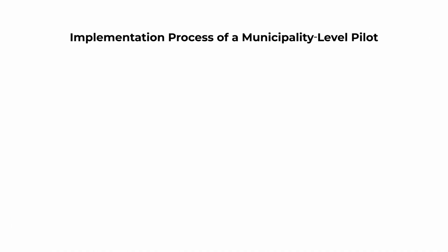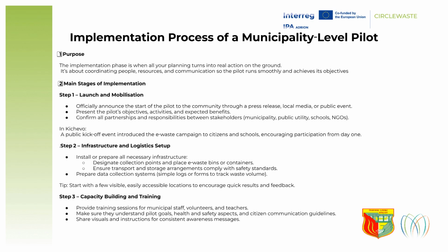The implementation phase turns planning into action, coordinating people, resources, and communication. Major stages include launch and mobilization, infrastructure and logistics setup, and capacity building and training. In Kicevo, a kickoff event mobilized citizens. Infrastructure setup involves collection points, transport, and data collection. Training ensures all involved understand goals and safety.